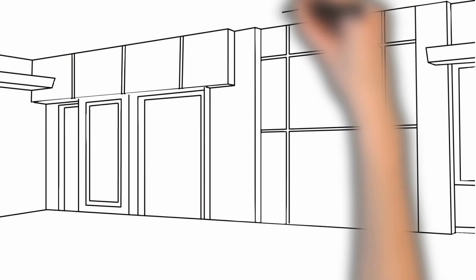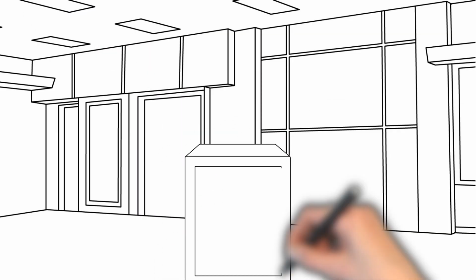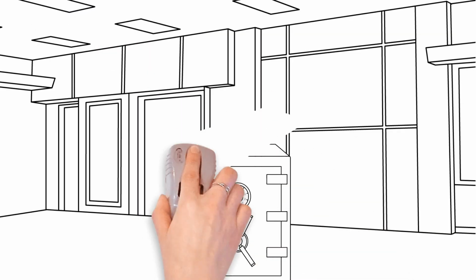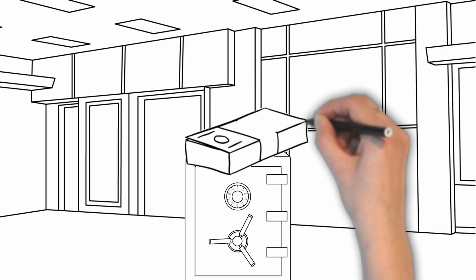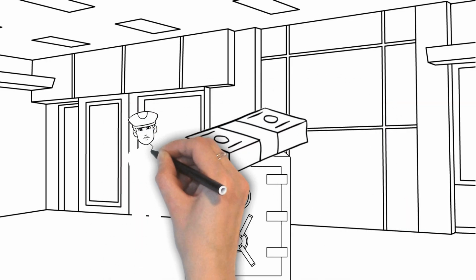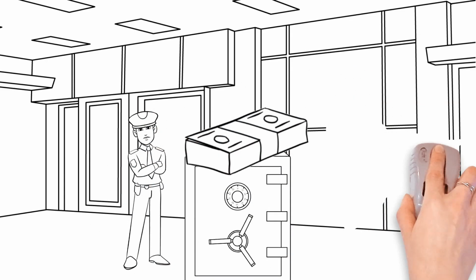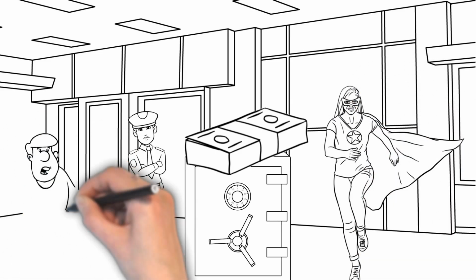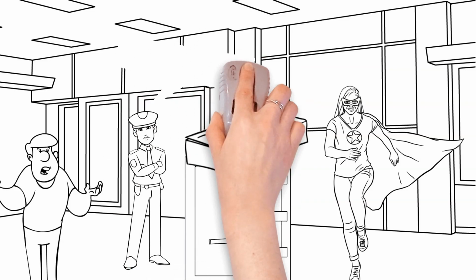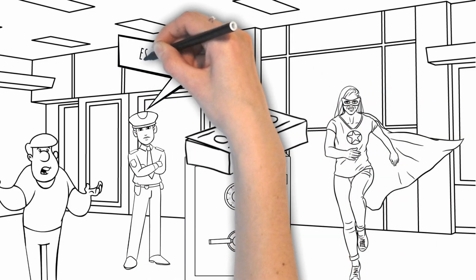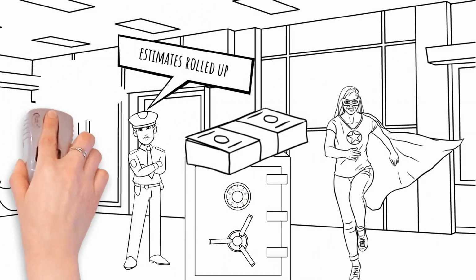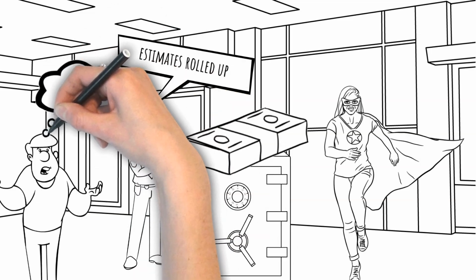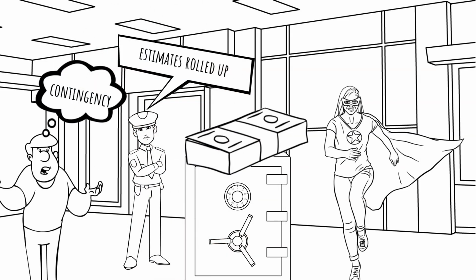Determining the budget is putting the estimate for all costs and the project along with the contingency funds and expected profits, if that's the type of organization, into a budget for executing the project. The accuracy of estimates rolled up here are reflected somewhat in the contingency funding assigned to the project, which we will describe a bit later how that works. And now you have a budget, and along with it, known risks and even some contingency to handle the risks.